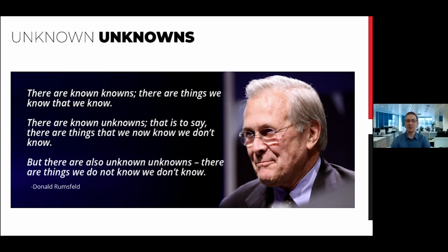As I mentioned before, we should try to identify as many risks as we can. Unfortunately, we will never be able to identify them all. All the risks that we haven't identified may be joined into a set. This set is called unknown risk. I said unfortunately, because we cannot classify it, cannot estimate the probability and impact, cannot choose the strategy and create responding plans. The only thing we can do is to create a buffer for handling them when they occur. This buffer is called management reserve.